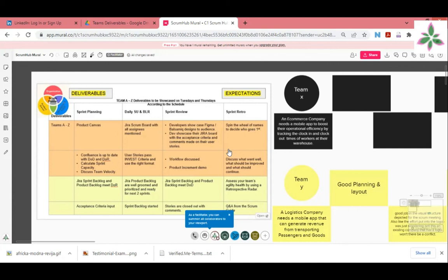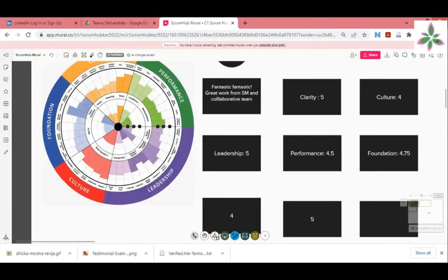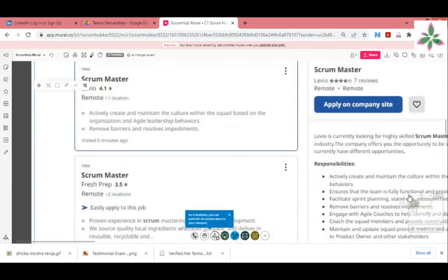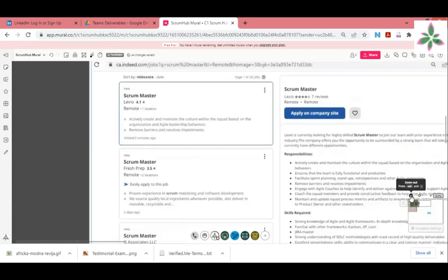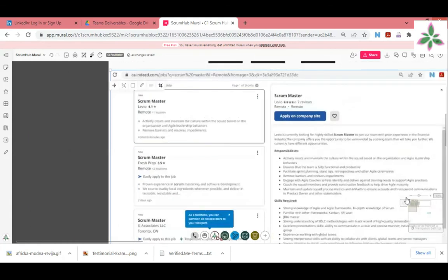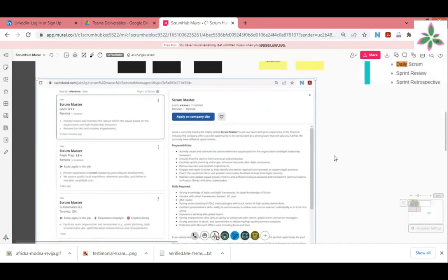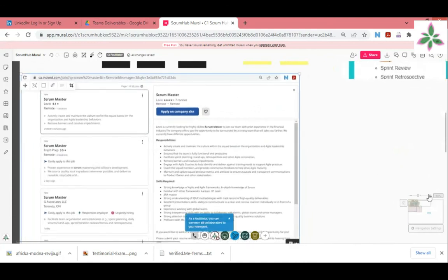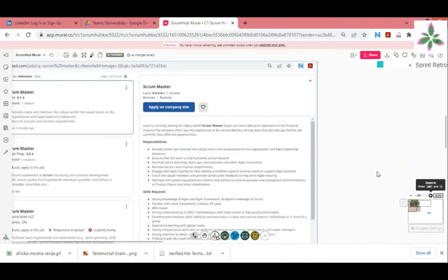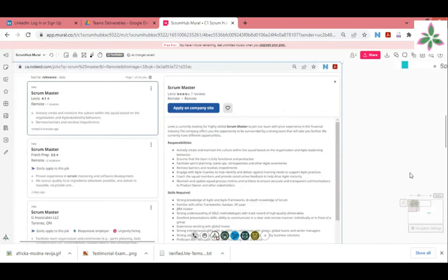The only thing the Scrum Master is majorly going to be doing at that backlog refinement is basically conducting the planning poker. So ensuring everybody understands the scope of that user story, and then presenting the planning poker, obviously not exposing it so it doesn't influence each team member's voting, and then exposing the cards when it's supposed to be exposed, and then putting in the user story accordingly. And that's what the Scrum Master usually does on the refinement session. But yeah, exactly what the coach said.